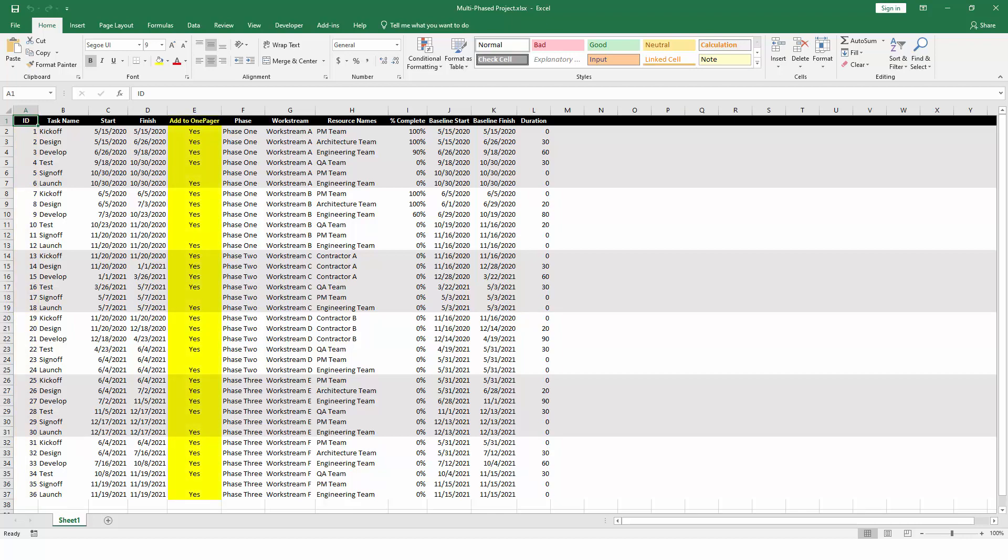Optionally, you can also decide to add a filter field to decide which tasks and milestones from Excel should be included in OnePager. This is useful if you have a large number of tasks and only want to report on some of them. If your Excel file is smaller, you can just tell OnePager to import everything.